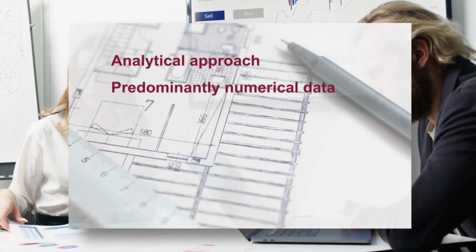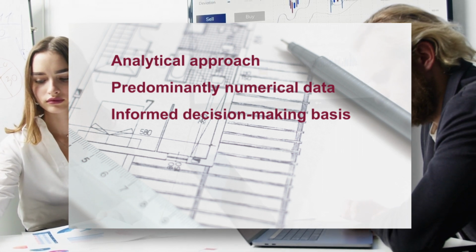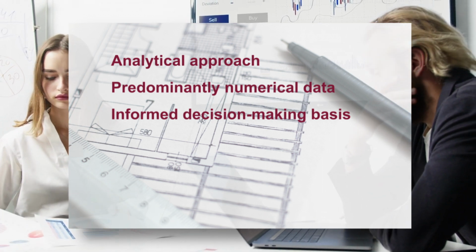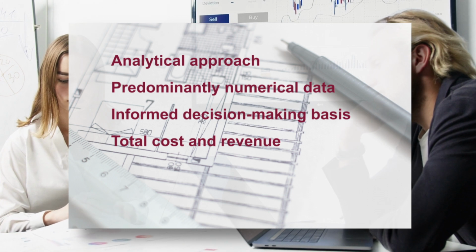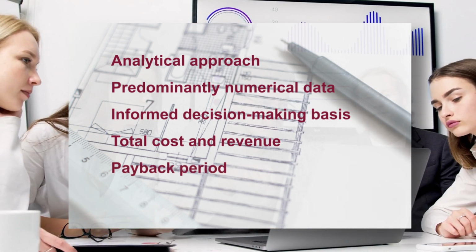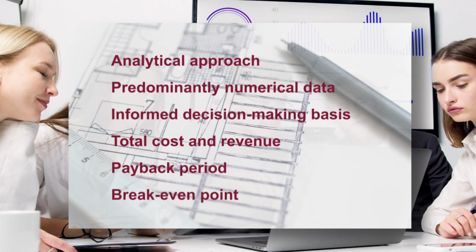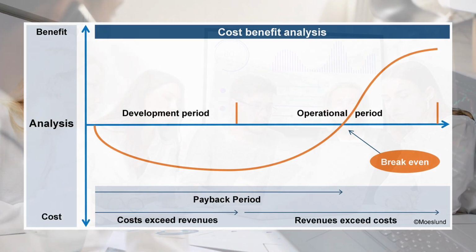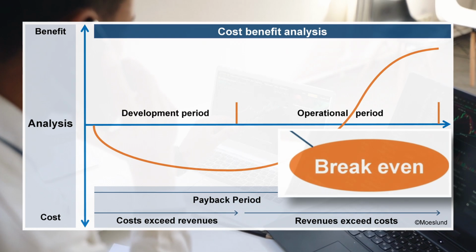You need an informed decision-making basis for the financial aspects from an assessment of the project's total cost and revenue from implementation, along with an estimate of the payback period and a break-even point for a potential profit. The crucial aspect for companies is most often the break-even point.